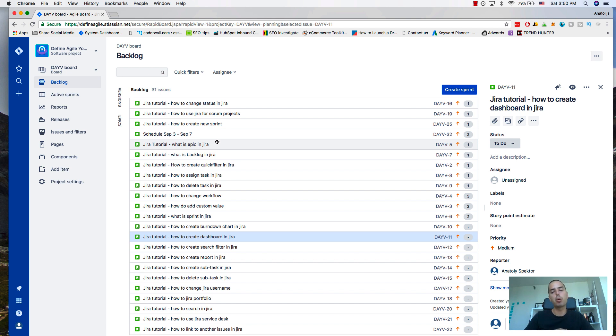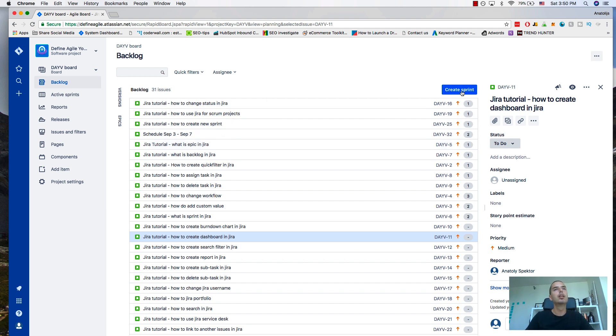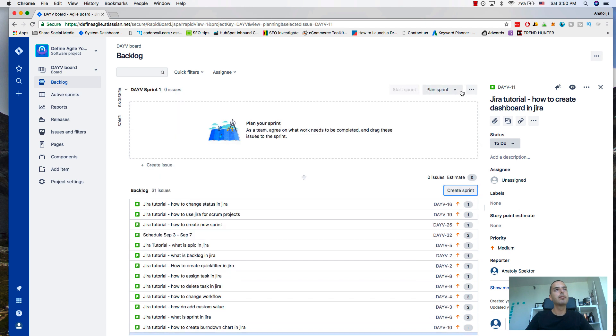To create a sprint, you need to click on a button above the backlog. So let's click on that. Now you see it created this field called DAV Sprint 1.